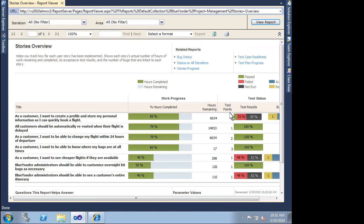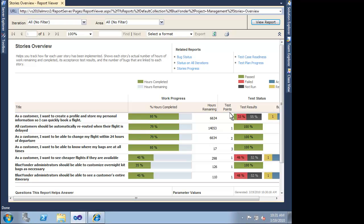The Stories Overview Report really helps us understand our progress because it brings together three key concepts. First, we can see how we are progressing on the user stories that define what we want to build. Secondly, we can see how far we are towards implementing what we want by looking at the code check-ins and accomplished tasks. Lastly, we can see the quality of what we are building based on our test pass-fail rate. Seeing this data graphically displayed immediately draws our attention to any potential problems. From this report, everything looks good.